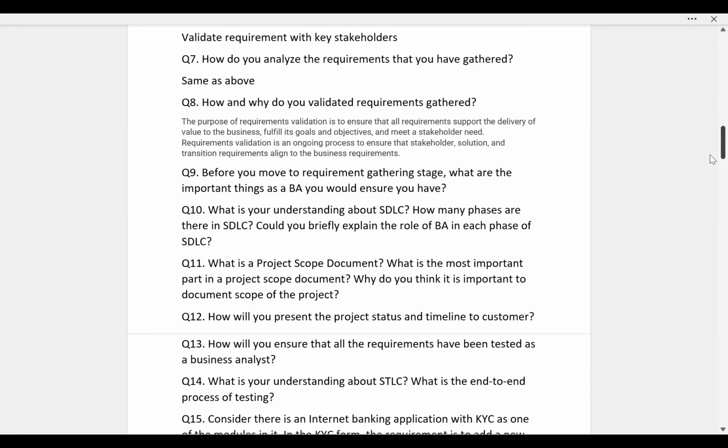Now, in the analysis stage, what do you do? In the analysis stage, you start identifying the key stakeholders in the project. You try to map the stakeholders according to power and interest, and the RACI matrix, if you remember. You try to map the responsibilities of the stakeholders with the high level deliverables of the project. And after that, you connect with the customers and try to gather the detailed requirements. So that is the analysis. So what is the output of analysis stage?